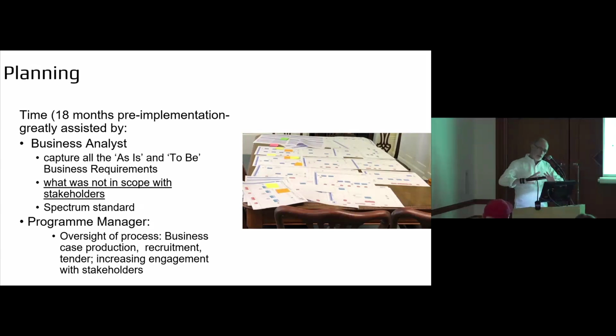So you set up this close team which can embed itself within the institution, because you're going to all sorts of different collections in different places. They need to be known, you need to have a profile in order to talk to people and get to know people, so it's really important. What we did was look at what we currently did, but also at the key requirements that we didn't have. We also had to cover what wasn't in scope and be quite explicit about the sorts of things that weren't in scope.